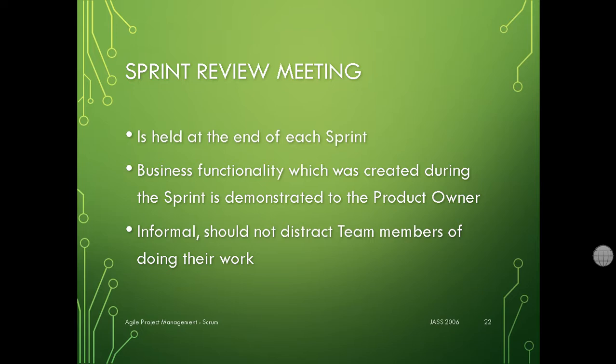After you finish the sprint, there should be another meeting that was not mentioned here, which is called the retrospective meeting. The retrospective meeting should be a meeting between the Scrum team itself and the Scrum Master to review what they have done, to learn from the mistakes or problems, just to avoid them in the next sprint. And that meeting should be just before the next sprint planning.